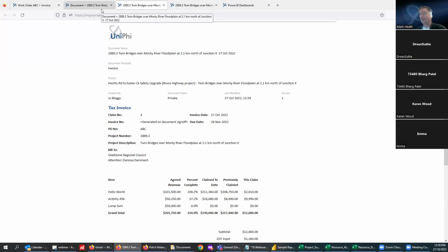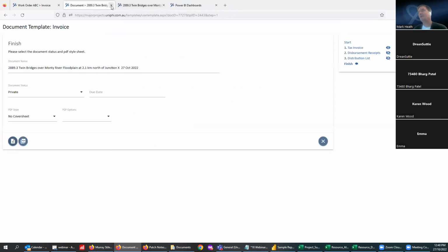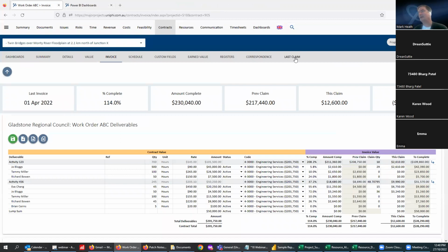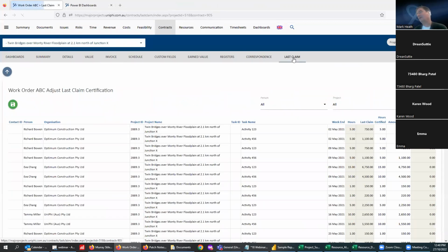They're all in the reports module, additional reports modules around timesheet, program, time and material, and comparison. And so by getting that to snapshot when we sign off that claim, you'll see now that there's on the right-hand side a last claim text. And so if any time gets rejected, often most companies will just have to create credit notes. But if you can actually adjust the previously certified rather than the previously claimed, and then reclaim it again, we provide an interface for that.